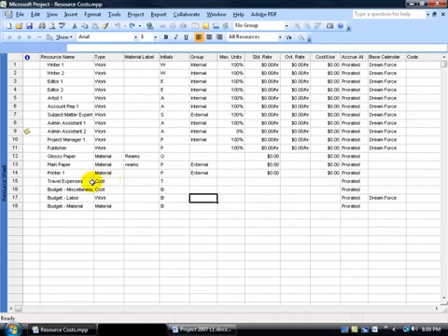Then we have our cost resources, which is a one-time cost or expense. In this case, we just have one for travel expenses. Now, don't be fooled: if we have one cost, that doesn't mean it can only be applied to one task. You can apply this to many tasks and have many different expenses for those tasks. For example, task 2, if you have to fly out of the city, you could say for the airfare, lodging, and meals, that's one expense. If you have to fly to another city on task 5, that will be another expense, and I'll show you how to enter in those expenses.